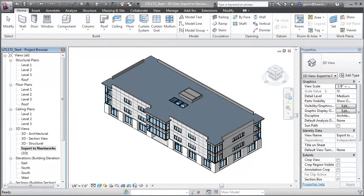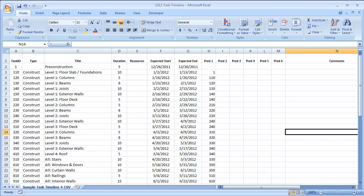We can create 4D simulations of construction operations and work plans using our Revit model in combination with Navisworks Manage. The steps involved include exporting our Revit model in a format that Navisworks can import, creating a schedule of the tasks required in the construction process. In this case, I'm using a simple list of tasks with expected start and end dates constructed in a spreadsheet program. Navisworks can import task data from many types of scheduling programs as well as from simple comma-separated value text files.